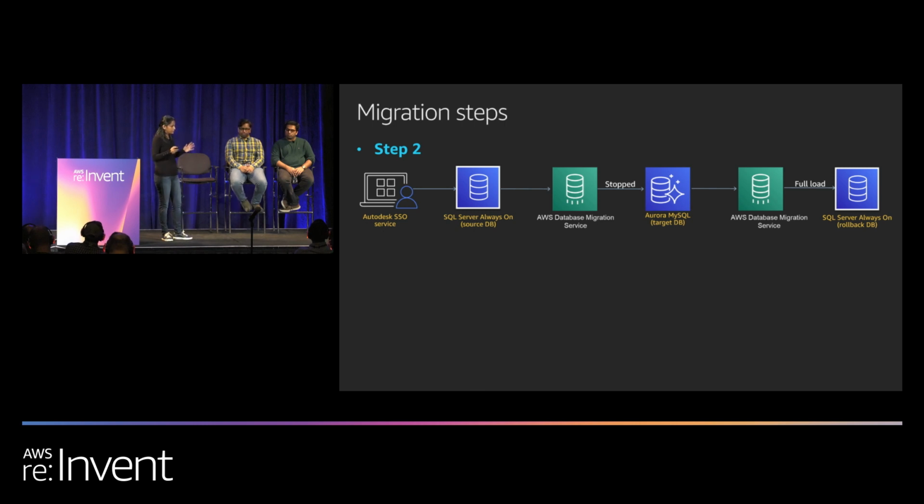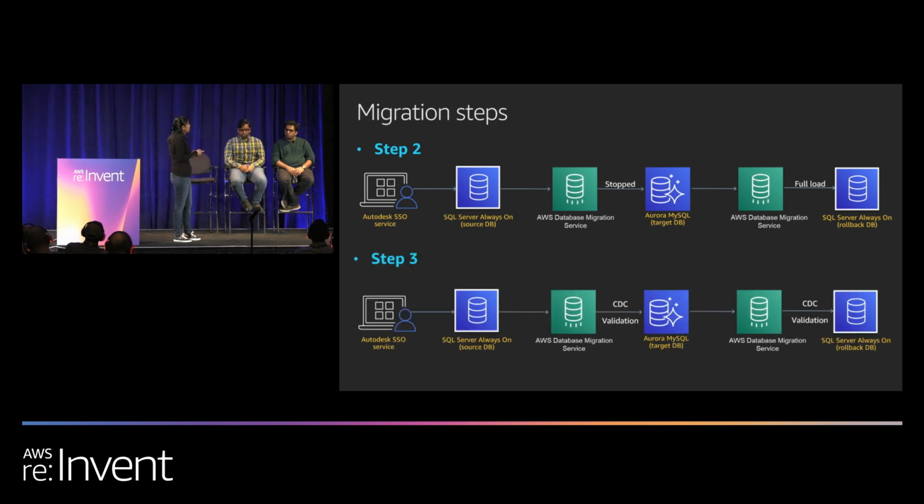So once we had completed all this setup and we had made the setup HA, we completed the sample validation for the key steps, and we enabled change data capture and the validation for both the tasks. And all through this while, we kept on monitoring the key CloudWatch metrics for migration. And once we noticed that the CDC latency between the source and the target is a low number, and the pending validation overall count has reached a low value, we knew that we were ready for cutover.